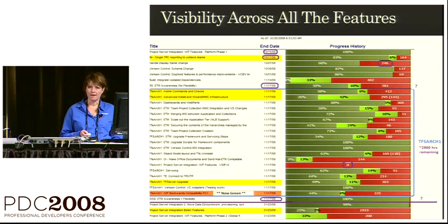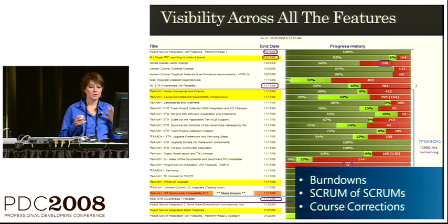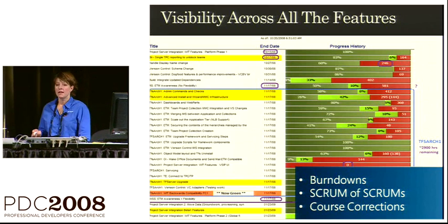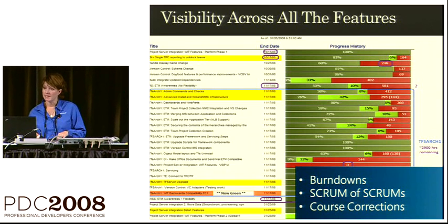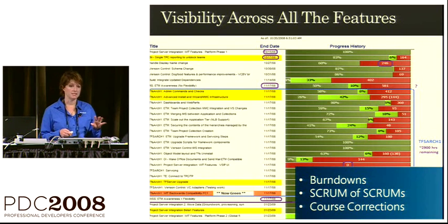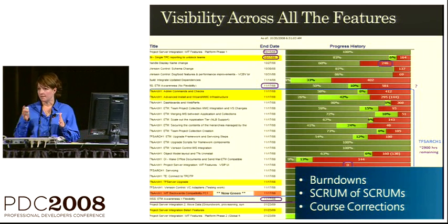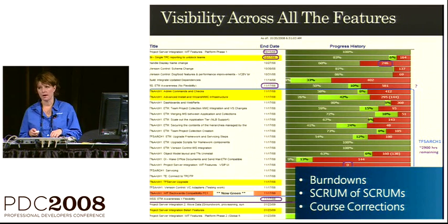And this helps drive our meeting that we have every week, which is the Scrum of Scrums, to watch everybody's burn down. So with all these metrics that we're collecting from our own data warehouse, it really helps us drive and drill down on the right issues. You also see some things highlighted red and yellow. Those are from the teams. They've highlighted their own work, red and yellow, as something that they want to raise as an issue or a risk or a big problem as part of that meeting. So it really helps generate some good understanding and focus on the critical issues and provide course corrections or help right there.